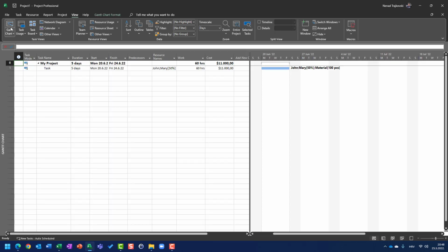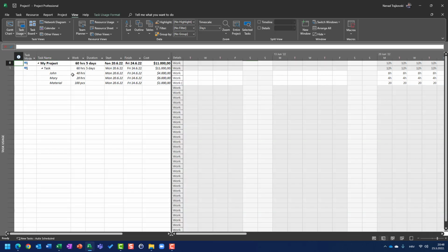I have here a 5 day task, and I assign John 100%, Mary 50%, and I have also 100 pieces. And if I use task usage, I will see that John is going to work 40 hours.